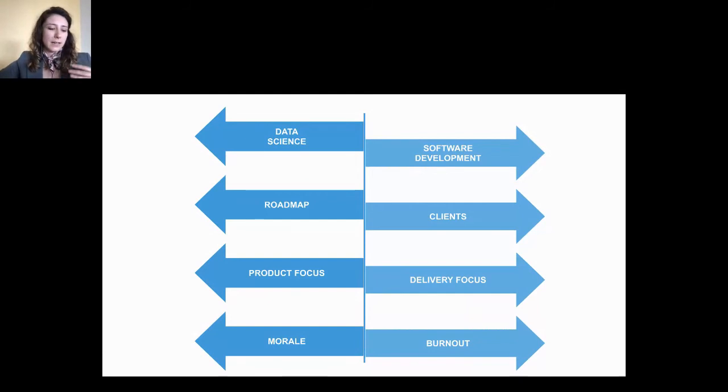So basically, yes, we are building a data science product, but in general, it is a product. So we really need to have a development team and also data scientists who understand how the product development is going on, what the process is, and shape themselves within this process. One of the things that was quite problematic was that we had sprint planning and sprint review sessions where the backend and front-end developers we employed were having tasks and finishing every sprint. On the other side, data scientists who performed research couldn't provide outputs in 2 weeks, which was the duration of the sprint.